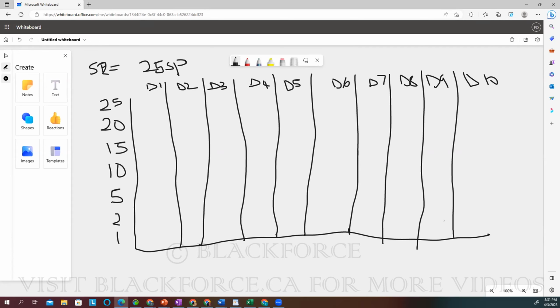Okay, so let's say on day 1, we didn't finish anything. Day 1, our first day, nothing was done. But by day 2, let's say we finish 7 story points. 25 minus 7 is what?